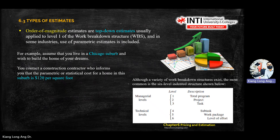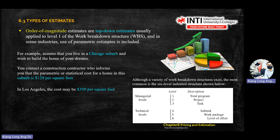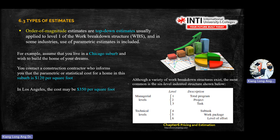For example, if you live in Chicago and want to build your dream home, you contact a construction contractor, and the statistical cost of a house in that area is $120 per square foot. In Los Angeles it can be double or triple the price. This is an example of order of magnitude — you compare based on location and statistical data. Each region has its own estimates. Similarly, each type of car has a price range — a sports car has a minimum starting price.